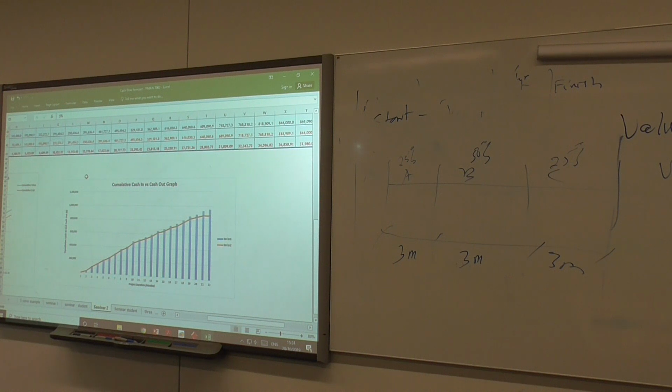So those are the kind of things you need as a QS to be able to forecast, so that when you're financing a project, your company doesn't spend too much in terms of locking up its capital in the project. At every point in time, you need to look at the amount of money that the company is locking up in the project from a deficit perspective and negotiate better payment terms. So that has to do with the cash flow.